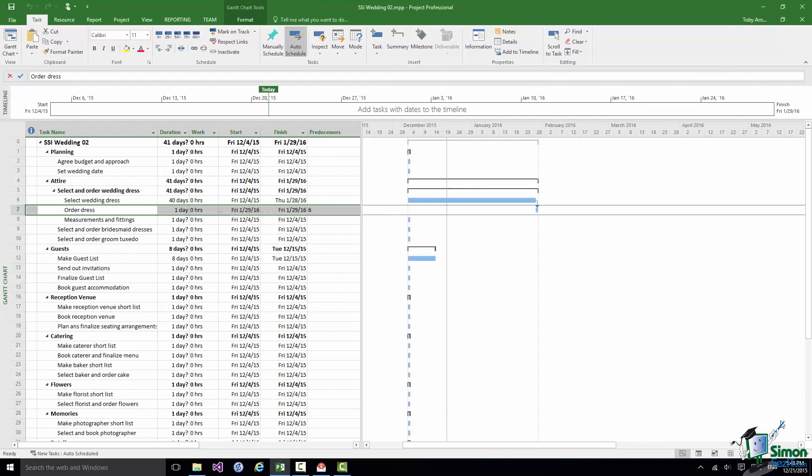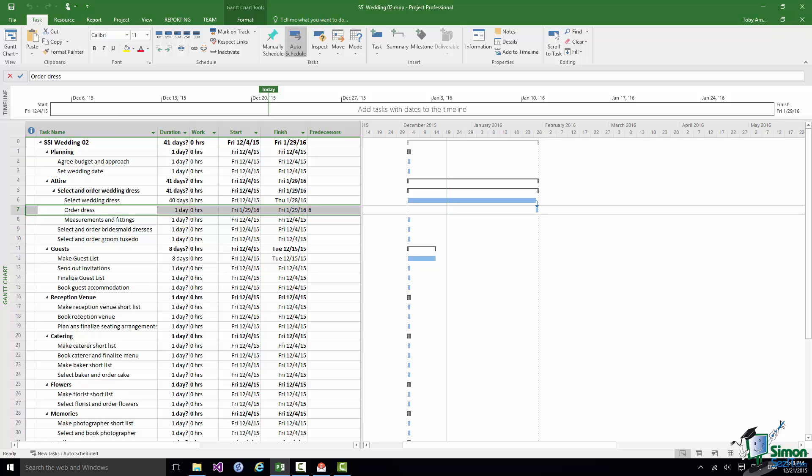Now once the dress has been ordered the measurements and fittings can start. There'll be a sequence of these until the dress is finalized. And once again let's assume that it's going to take a total period of 40 days for that to all happen. So we can select Task 7 and we can select Task 8.